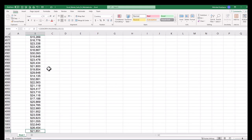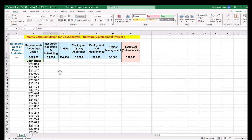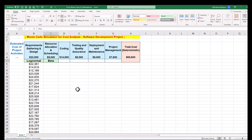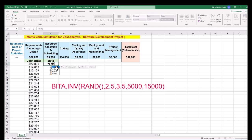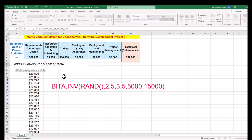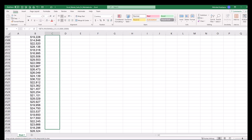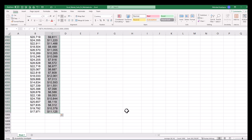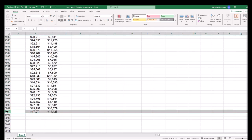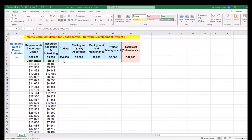The second project activity of resource allocation and scheduling has a single point estimated cost of $9,000, and the best fitting distribution to the historical data is beta distribution. We can generate random inputs by using the beta inverse function. Then click and drag down to generate 5000 random numbers following our beta distribution.